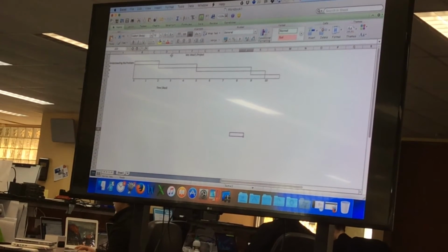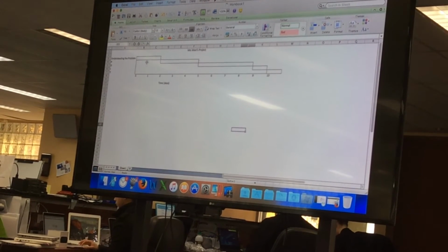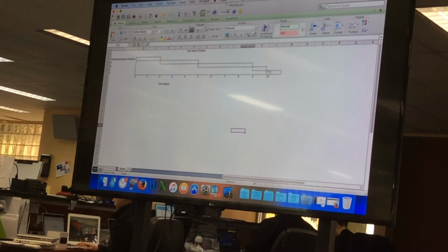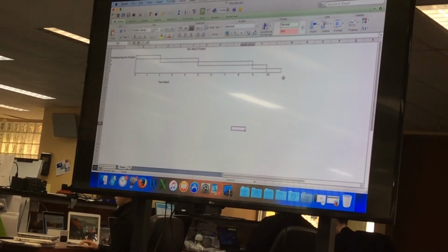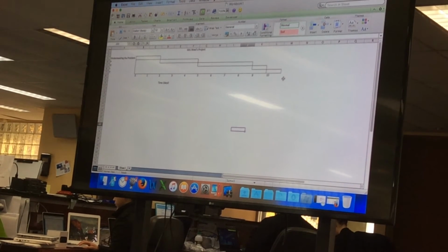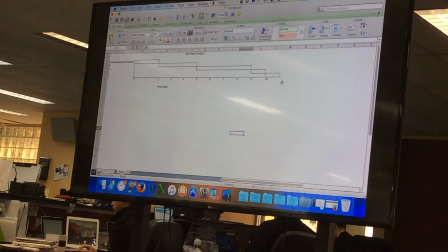So the good thing about this, it sort of maps out how long you think each stage is going to take. Be mindful that these stages come after each other, so we've actually got something called a traditional or a structured or a waterfall method of the project development life cycle, which means you don't start the next stage till you finish the previous stage.